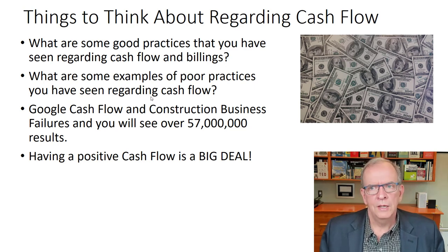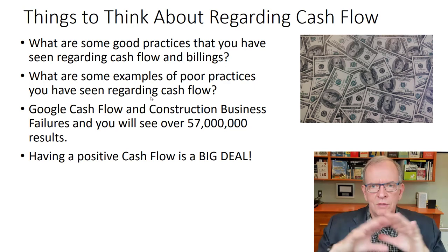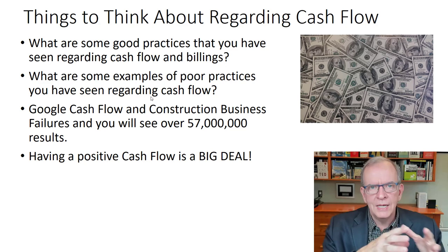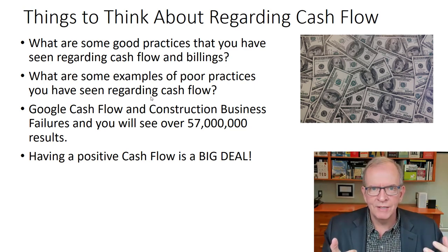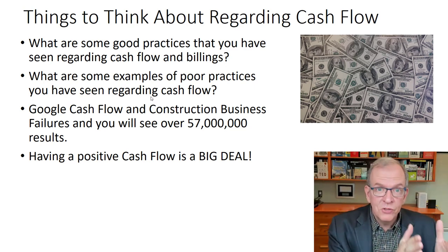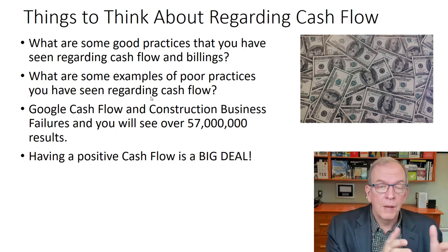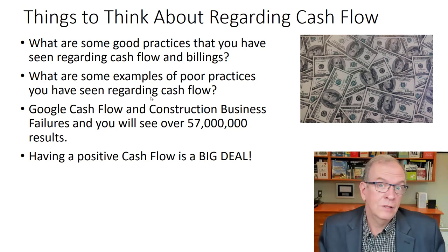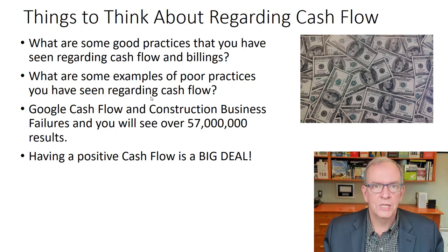So cash flow is a big deal in construction businesses. Take it seriously. The reason I'm telling the story about him is that, for the size of projects he typically did, that seemed to be a large amount of money to have outstanding for that one client, because he was a smaller contractor, and to have 100,000 owing from one client without having your schedule of values smaller and your payments smaller amounts. It could have been half that amount if he had been billing every 2 weeks, as an example. That's less damage that way, right?